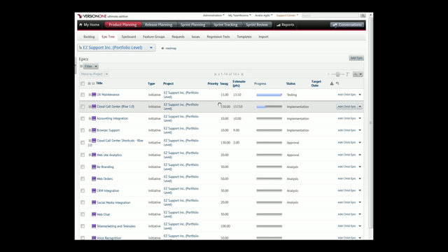Is this still the item that's going to give us the most value now that we know that the cost is much higher? And also you're taking into consideration where you are with it. If you learn that information very late in the process, you kind of have to say, well, given where we are with having already invested that, it's kind of sunk costs in the software we've developed, we now know it's going to be this much more, knowing that, what makes sense.